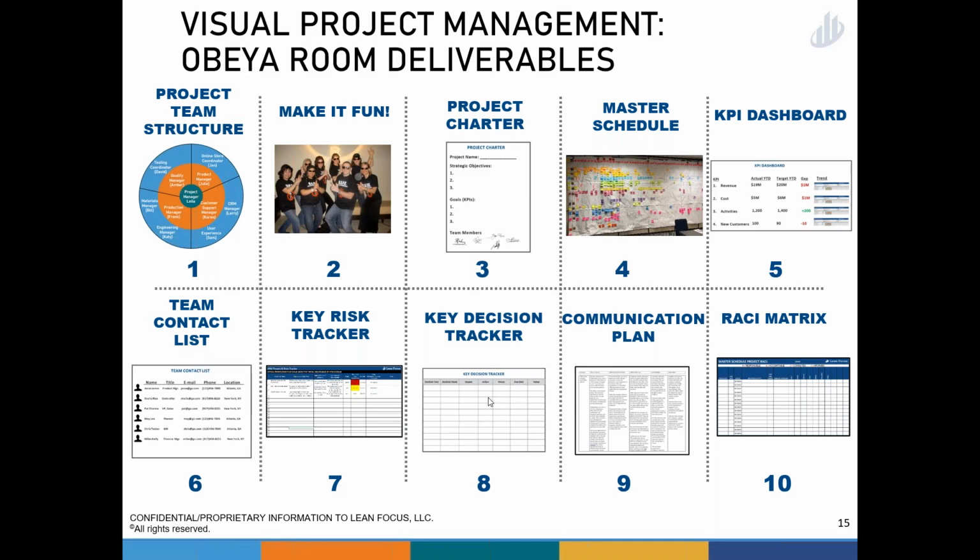The key decision tracker, okay? So in the simplest form, this might be the milestones for your product development process, right? So at the end of phase 2, requirements are well defined. Our decision at that point is, are we going to sign off on that and begin quote unquote cutting metal, right? Are we going to begin really jumping in and doing the heavy design work, freezing those design requirements, understanding that if those requirements start to change, we're now generating some waste, some of that rework that we have to do.